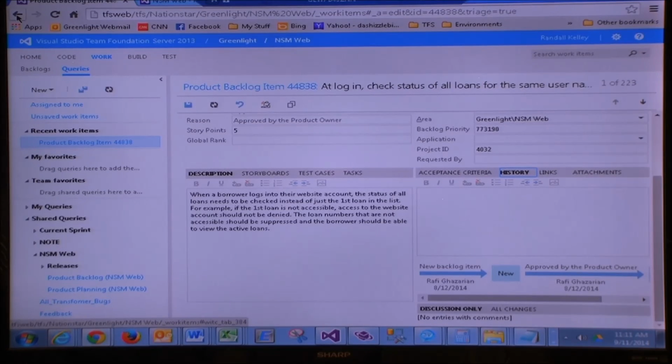Yeah, that's another thing too, is that we've never used story points here. A lot of people don't even know how it works. Right, and then the other problem with potential story points is there's 8 teams under Ryan, give or take. 8 points to you is different than 8 points to them, because it's a different effort level. So at least it should be in the same ballpark, but it's not like a chart that I wanna produce that says, 8 points equals 25 hours. You don't wanna create that chart because then it might as well just be hours. Yeah, it's concrete. And that defeats the whole purpose of story points.